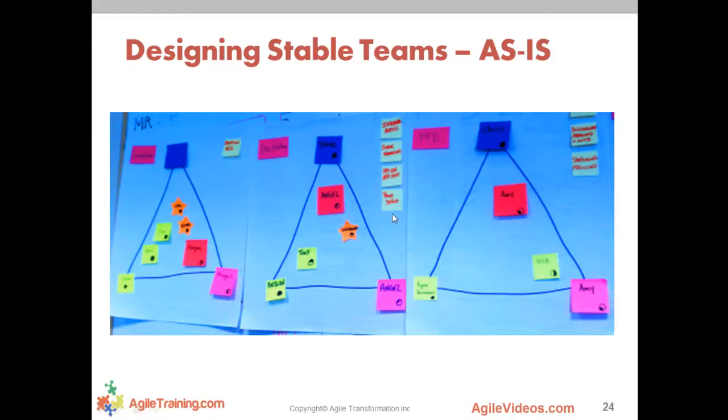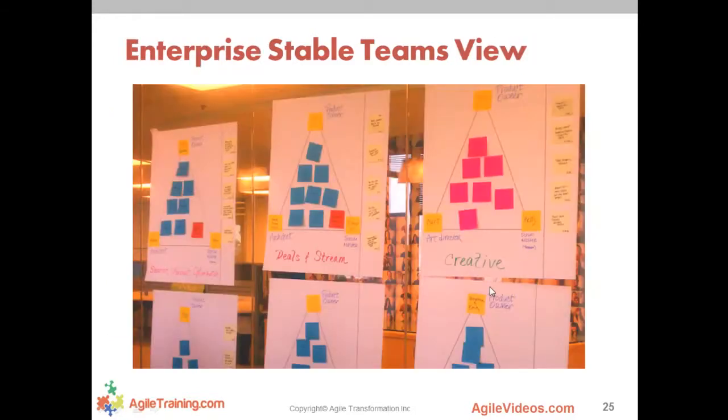The items over here are the next features that are their deliverables on their backlog. And the most beautiful picture that you can have, and we've had this at several organizations, is when you can have many of these flip charts up, and that's your big as is. That's your capacity plan. That's who's working on what right now and what percent allocation are they. And then you can start making decisions around, do I really need 3 developers in this team to all be half-time? Can I make 2 of them full-time and have that one person be full-time on this team? These tough conversations begin to happen.